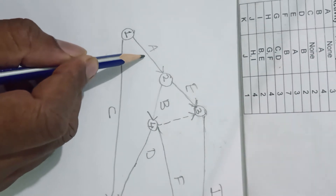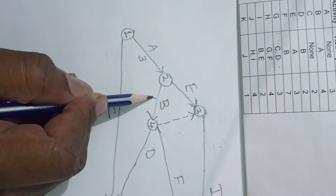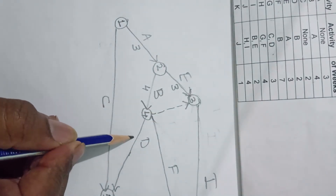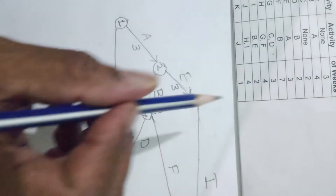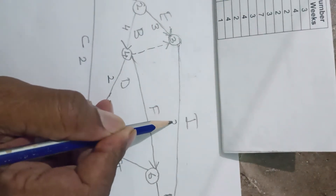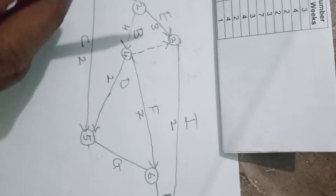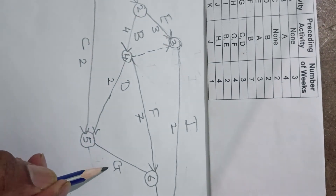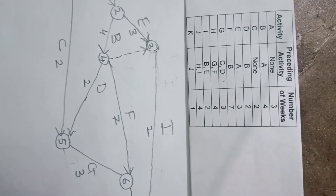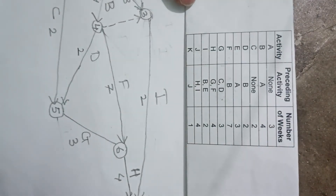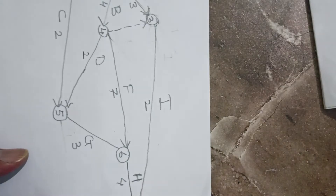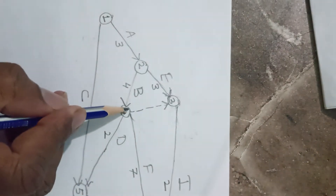A is taking 3 weeks, B is taking 4 weeks, E is taking 3 weeks, D is taking 2 weeks, C is taking 2 weeks, I is taking 2 weeks, F is taking 7 weeks, G is taking 3 weeks, H is taking 4 weeks, J is taking 4 weeks, and K is taking 1 week. We have captured all the durations of all the activities.